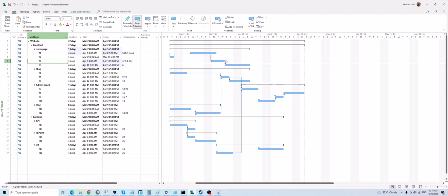You are going to destroy and create problem. Then you have to fill the cement again. You have to wait. That's the nature of work. You fill the cement, wait for 1 or 2 days, then the cement getting hard and ready, then you move to the next step to build something on top of that cement. Okay, that's the nature of work in this case.